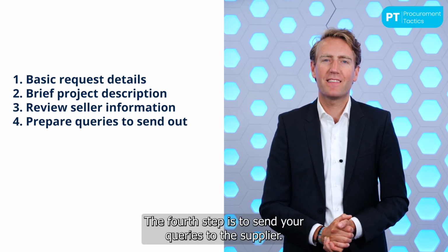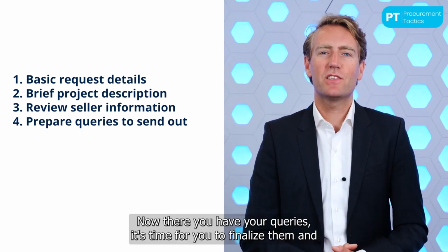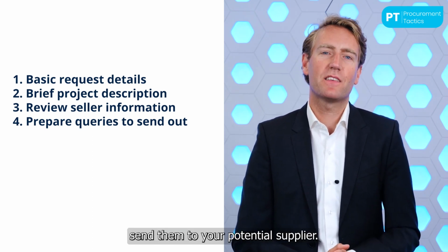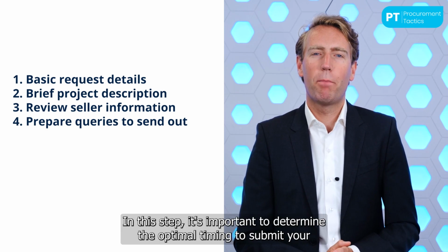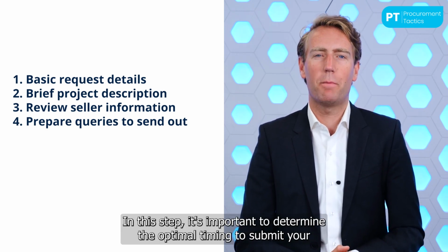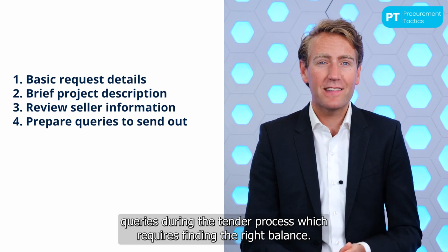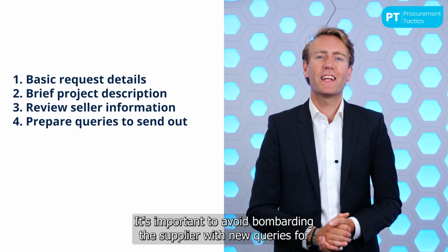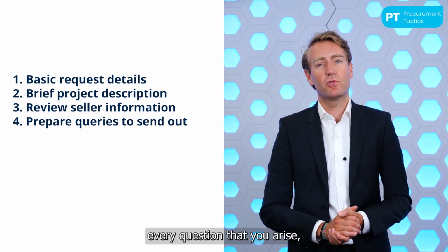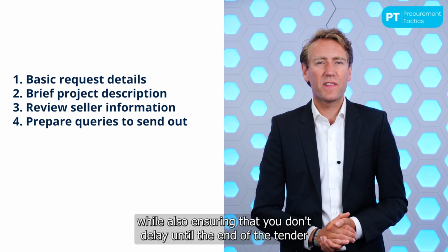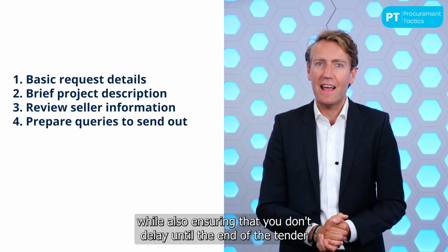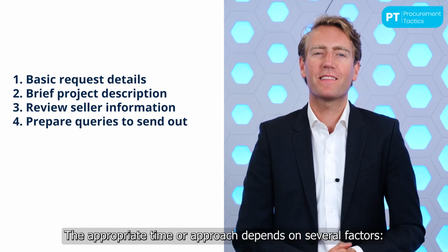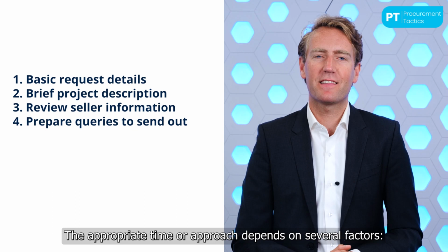The fourth step is to send your queries to the supplier. Now that you have your queries, it's time for you to finalize them and send them to your potential supplier. In this step, it's important to determine the optimal timing to submit your queries during the tender process, which requires finding the right balance. It's important to avoid bombarding the supplier with new queries for every question that arises, while also ensuring that you don't delay until the end of the tender period when a supplier may have limited time to respond. The appropriate time or approach depends on several factors.